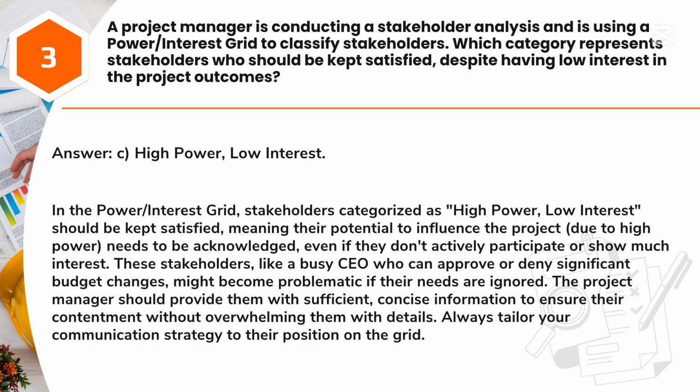In the power/interest grid, stakeholders categorized as high power, low interest should be kept satisfied, meaning their potential to influence the project, due to high power, needs to be acknowledged, even if they don't actively participate or show much interest.